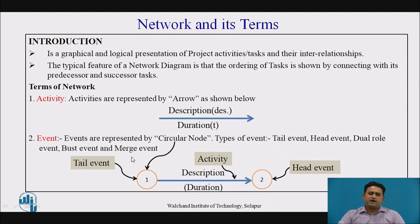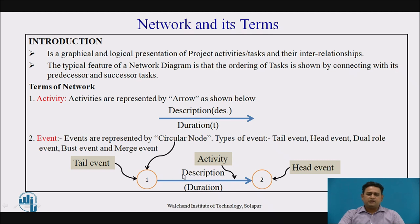Now, events are the parts in the network diagram which are presented at the start and the end of a particular activity. The event does not consume any resource or time. Here, we observe that a particular event is represented by a circular node. Here, 1 and 2 are the particular circular nodes which are the events of the activity. Node 1 is at the tail of the activity, so it is known as a tail event. Node 2 is at the head of the arrow, so it is known as a head event.